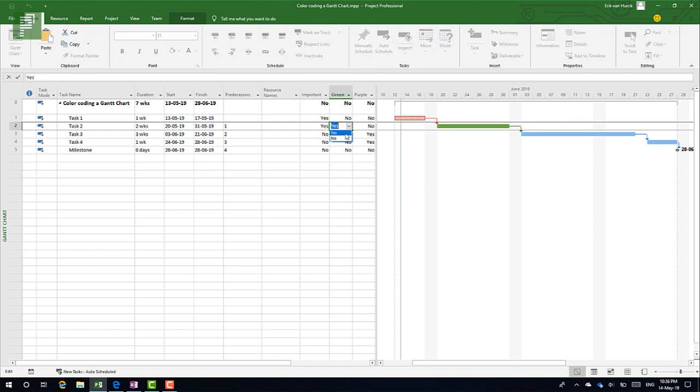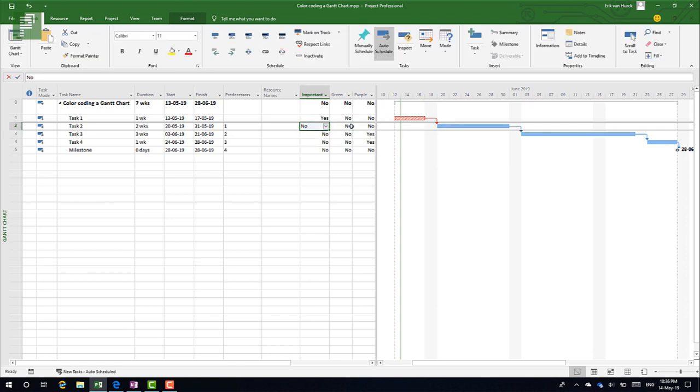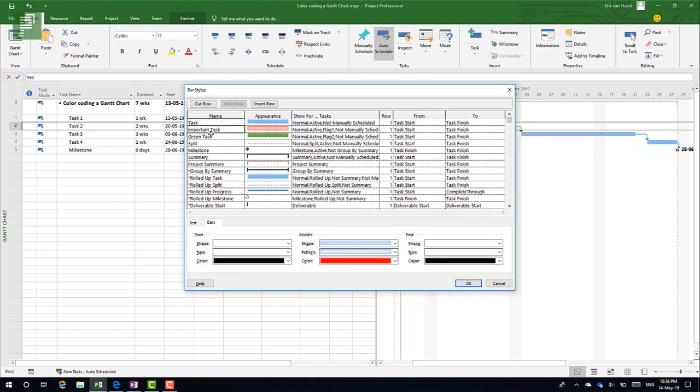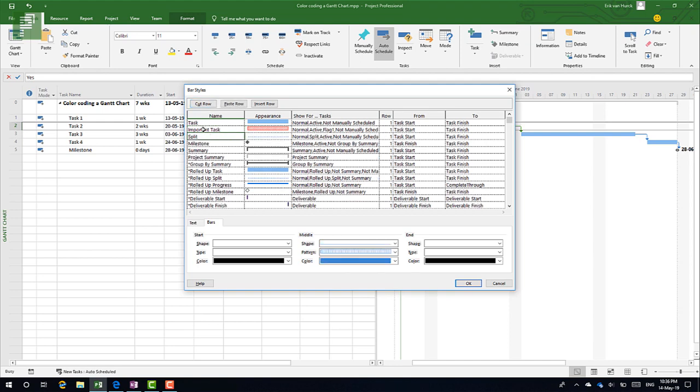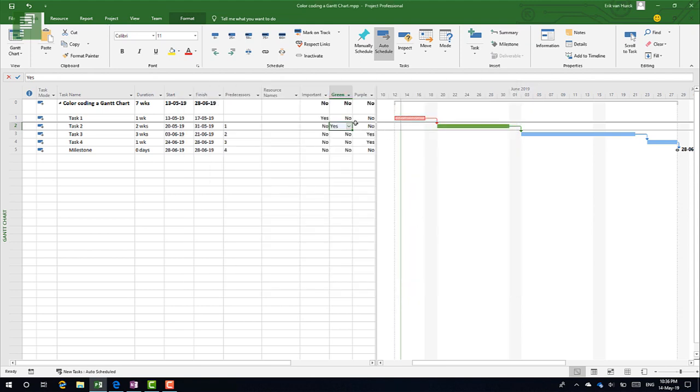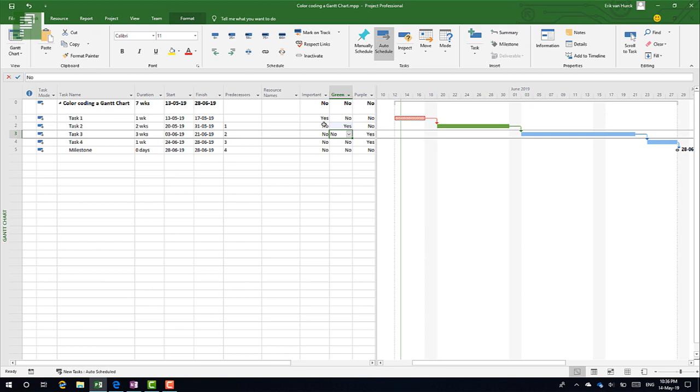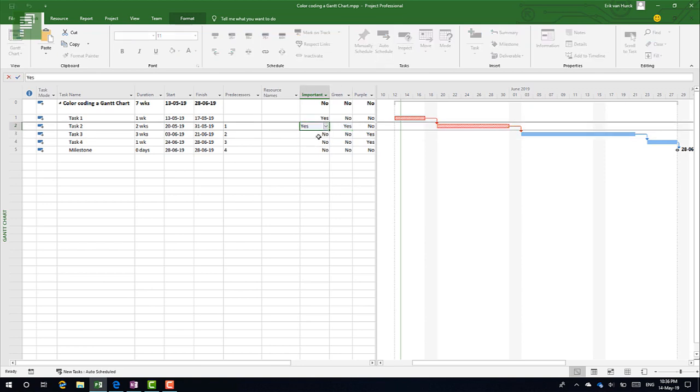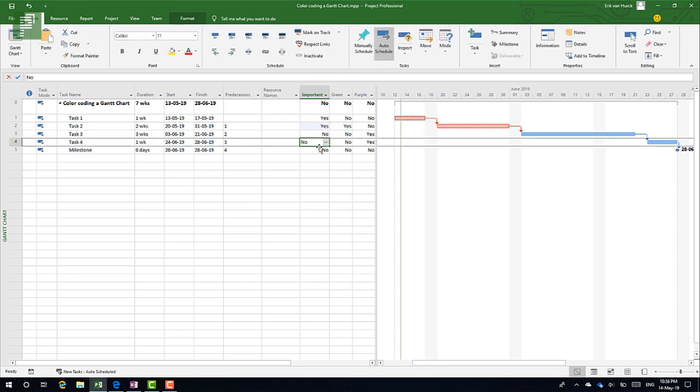So let's change that and let's get this show back on the road. I'm going to cut row and I'm going to paste row. Now it's on top of the Important tasks, so the Important task will take precedence over the green task and the actual task. Let's see that happening. So currently this is green, and if I change that to Yes, it will overrule. So that's how to do it: make sure that the most important thing on task level is actually on the bottom.